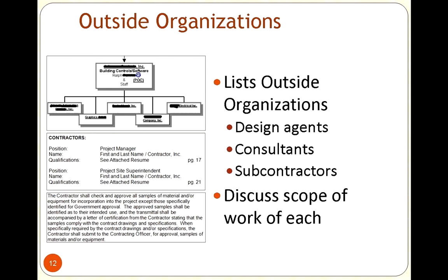We would sometimes have procedures that says if we were working with company A who contracted company B, I may not be able to necessarily go straight to Company B to tell them what's going on, but I certainly would get them in the same room and say, this is what we're looking for. We need samples of this. We need expectations of that. We need drawings of this. We need a material list for that.